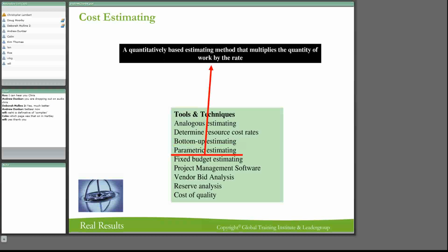Let's say that you were going to put in or construct a telephone line, and there was going to be 800 telephones on this end of this telephone line, and you had to construct that. Now I can tell you there will be tables about how much it's going to cost you, because often these things are already predefined. For example, the distance between manholes is already defined. The size of the cable is going to cost you per meter. So you're going to know if you do 100 meters, how much it's going to cost you. If you're going to do a kilometer, it's how much it's going to cost you. That's parametric estimating.